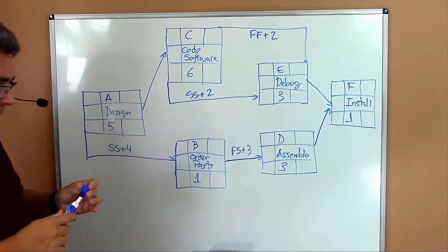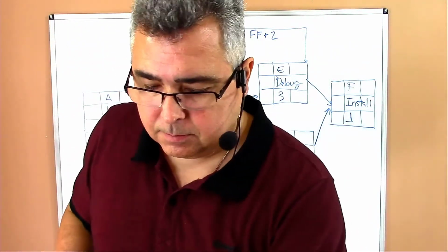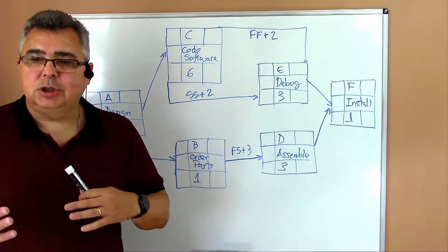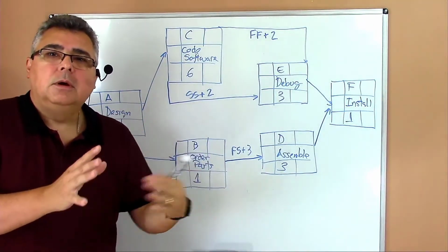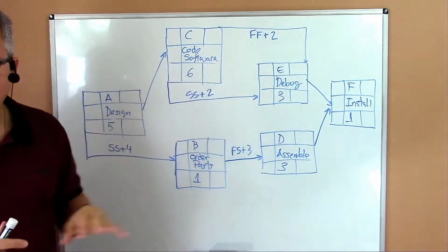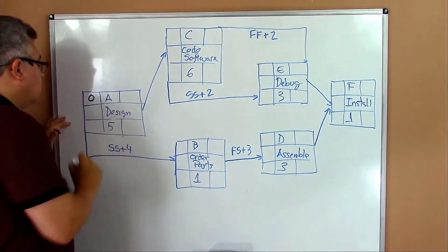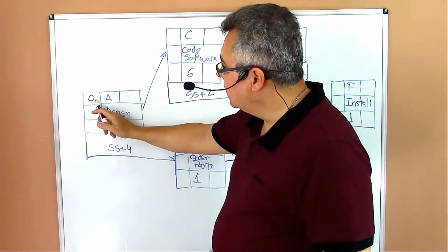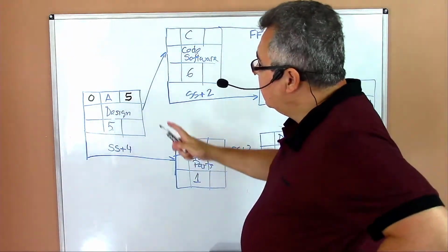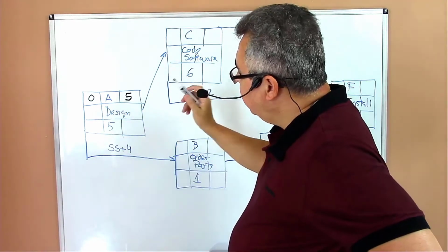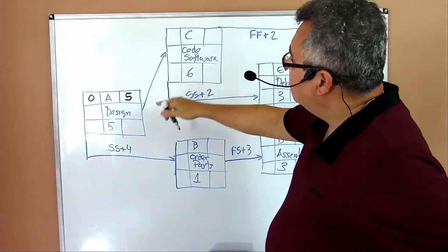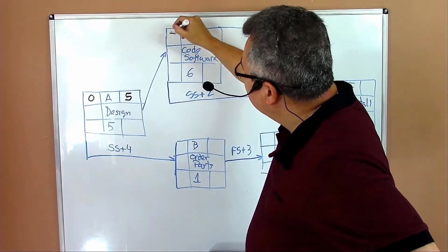So now let's solve the network. Is that okay? When I solve the network, I will try to explain the relationships and understand the real motive why the project manager decided to design the network the way it is here. Okay, so we start with 0, as in any other network. 0 plus 5, 5. So we are going through the forward path. After task A, we have 2 tasks, task C and B. For task C, it is direct. You go here and you do 5.